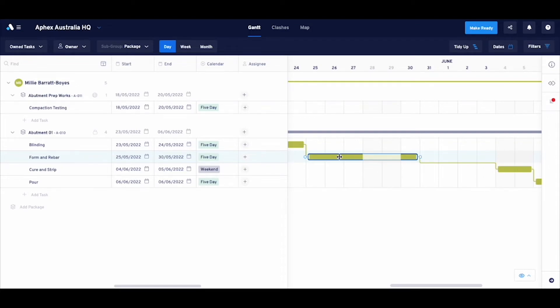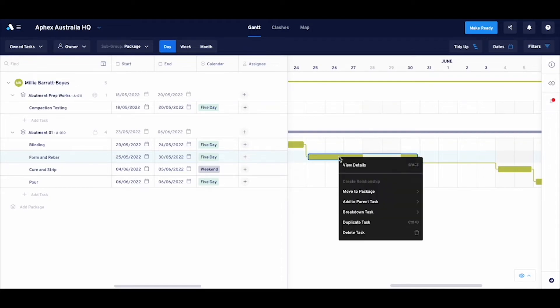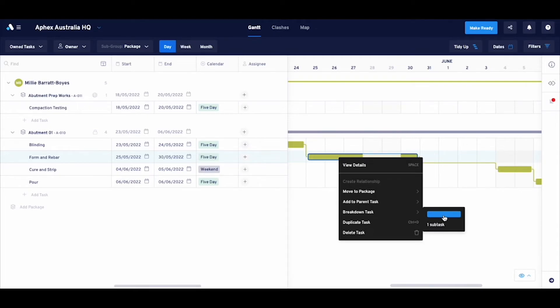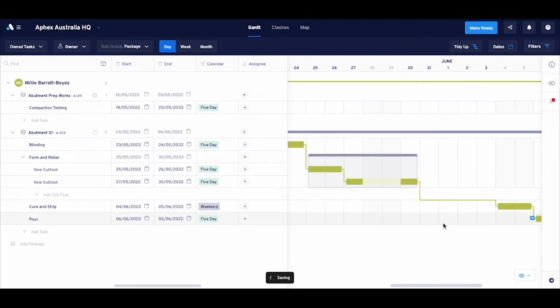Well, by simply breaking the task down. This is done by right-clicking on it, heading down to breakdown task, and then choosing the number of subtasks I want—in this case, two.